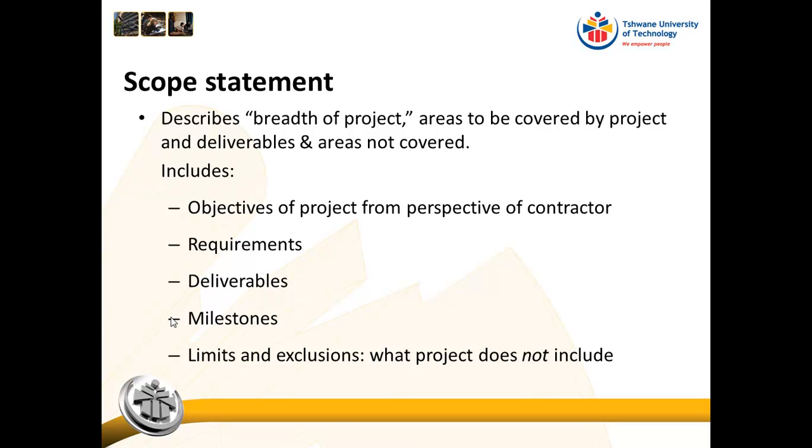Because if you think about, for example, the project charter, it wouldn't make sense to generate the project charter and then do the scope statement and the work breakdown structure and the detailed planning, and at the end of that then ask the client to sign all of that off. Because if the client had seen the project charter, they might already have realized that we were on the wrong track. So milestones are there to make sure that we are still on the right track, and to give the clients and or the performing organization the chance to give an input as to where the project is going.